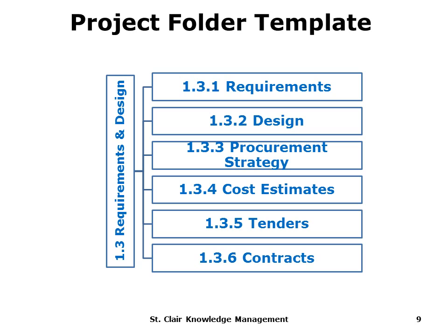Now, depending on how many people or the type of people that you're going to engage to do the work, you may need a procurement strategy. What we mean by that is, are you going out to tender? If you are, you're going to consider 2, 3, 4, 5 different bids. Do you need to go to the European Union to get approval if the resource budget is over a certain amount of money?